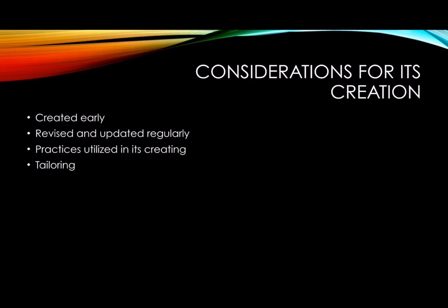This plan should be created early on in the project lifecycle. It should be reviewed and updated regularly, especially if stakeholders change or if entering a new project phase. It creates clear lines of communication by detailing how communication will be planned, structured, implemented, and monitored. This plan will utilize practices in its creation that include stakeholders in project reviews and project meetings, utilize social computing, and utilize a multifaceted approach to communication.